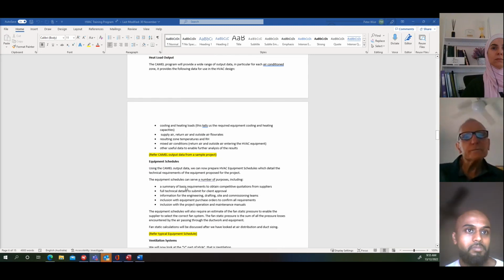So initially, the equipment schedule would be something that you could, for instance, put together as a preliminary equipment schedule to send out to a supplier or two suppliers to get competitive quotes. So that might be your first step.